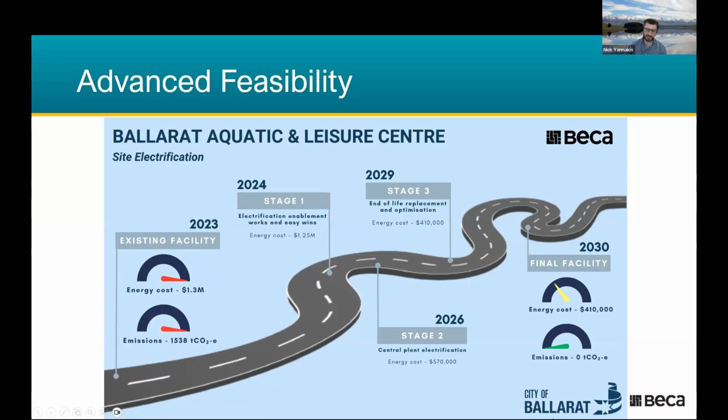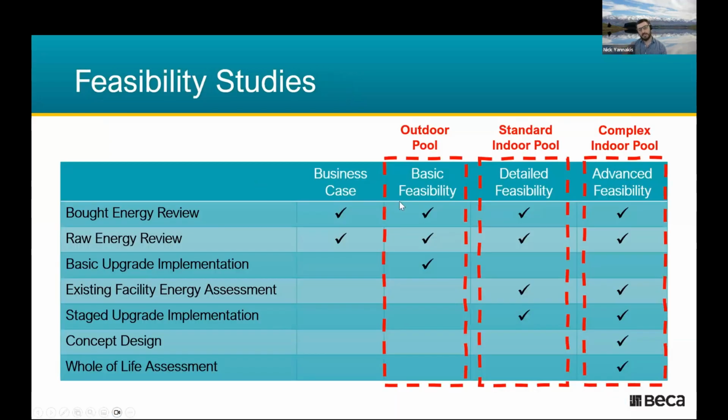So I'll go back to that original slide, and there's a holistic view that I've taken, and Jack is exactly right about the concept design. You can't price a concept design, particularly on how hard it might be in implementing the stage and how much that is to do. It's really nice, and you could put it in with a provisional sum and continue with it later, and that's design as well. And also that could be done on an advanced feasibility, but I would almost draw a line at the detailed feasibility first before you go on further.